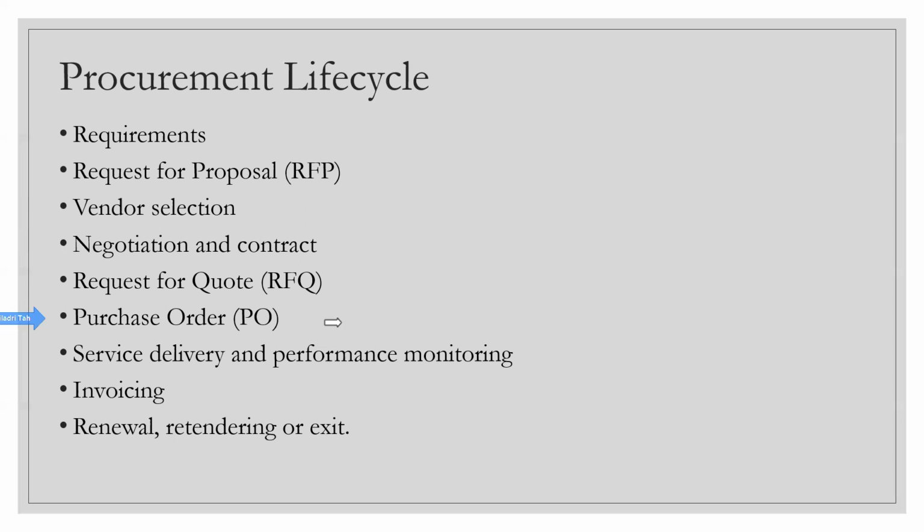How do you vet a quote? You look into past quotes. Number one. See, if it's a day one or a day two, we already know at the back of our mind how much money is to be spent to get an MDF done. To get an MDF done for 250 people or 1000 people. We should be having that data by now. We have done so many MDFs, like so many day ones, right? And every delivery TPM in CIS will know that number. Not the exact number to the dot, but a ballpark number. They will know that, okay, this much amount of dollars we have to spend to get an MDF, a minimum MDF, in a building with one single floor or with 10 floors, right?